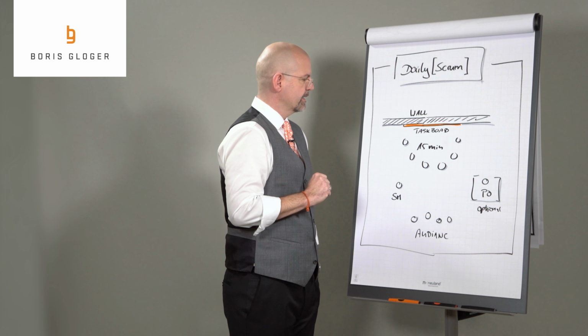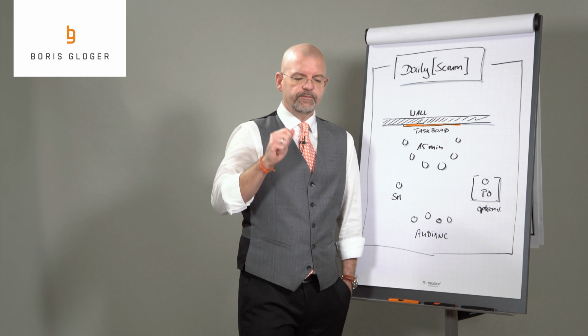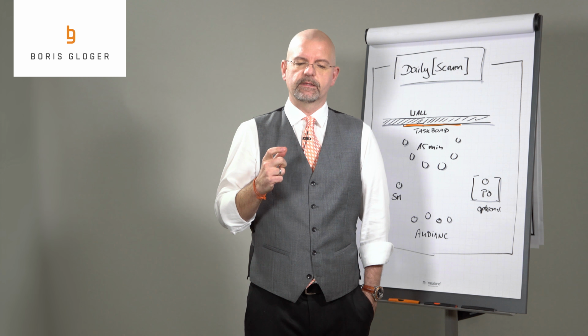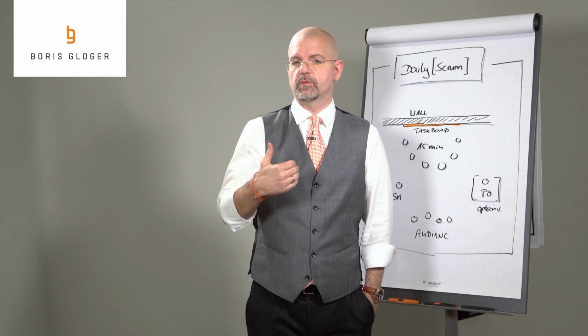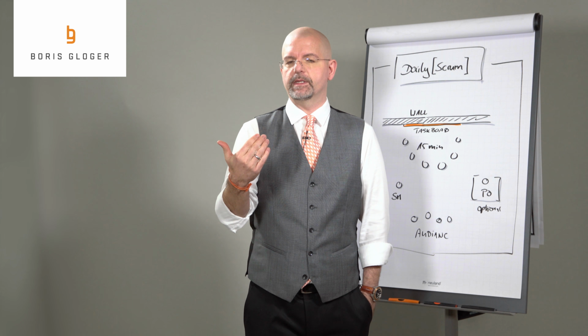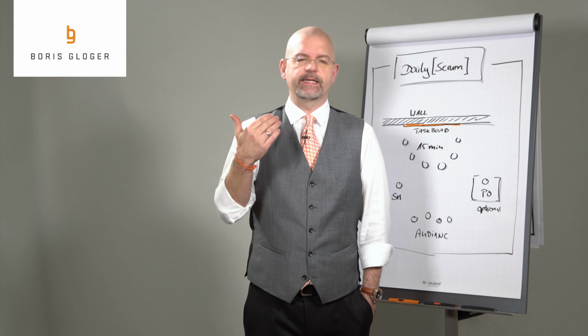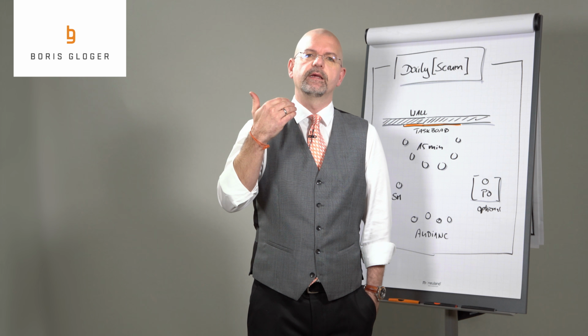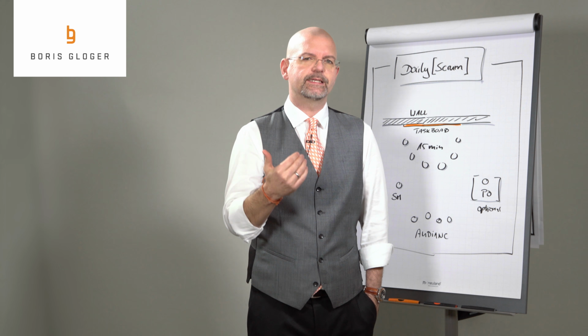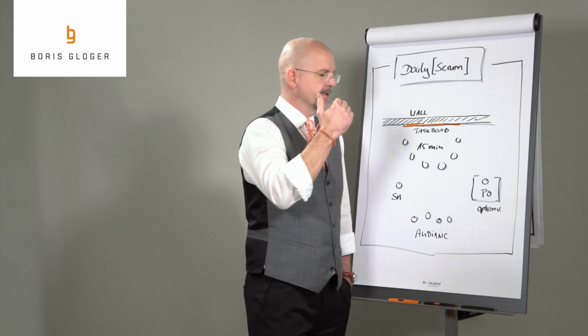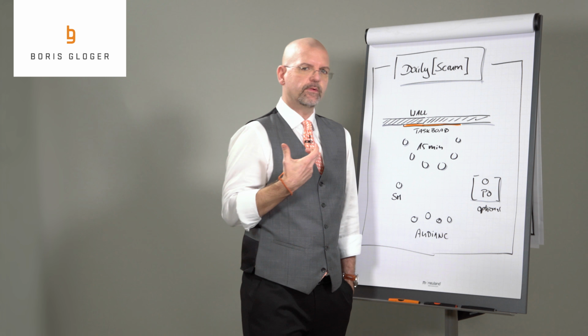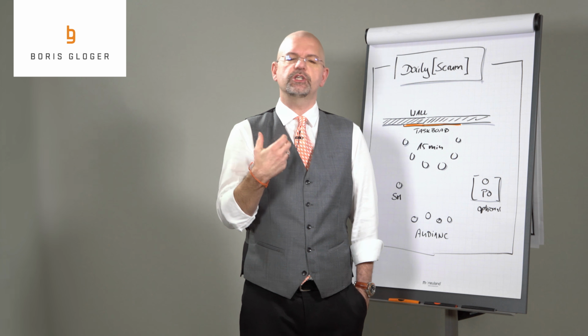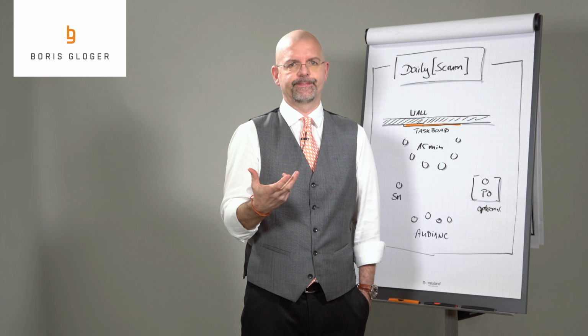Last remark, a lot of people still think about dailies as status meetings, so a reporting meeting to upper management or management at all. It's not, it's more or less a demo meeting. The team members demo to each other what they have done yesterday in order to talk about what they will do and produce today.